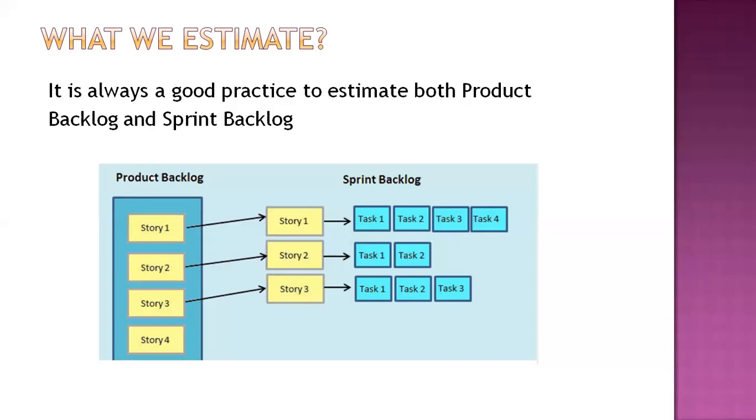Second, your product backlog is going through a lot of changes. The scope changes are at a peak. Then how are you expecting the velocity to be stable? So if you are in a team where you have a very stabilized team and your velocity trend does not have too many ups and downs, then velocity will give you major control to plan your sprint. Otherwise, it's best to go with capacity.